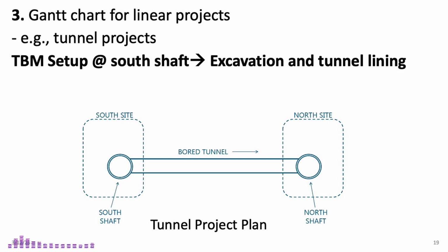Next is excavation and soil removal. As the TBM advances, its rotating cutter head grinds through soil and rock. A conveyor belt system behind it removes the excavated material, carrying it to the surface. Then, we move to tunnel support and lining. To prevent collapses, the TBM installs precast concrete segments along the tunnel walls. These segments form a reinforced ring, ensuring the tunnel remains stable.